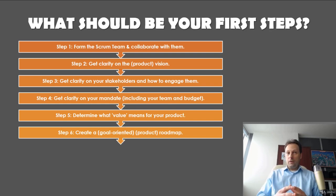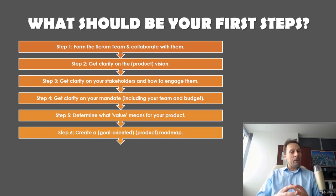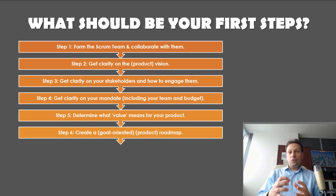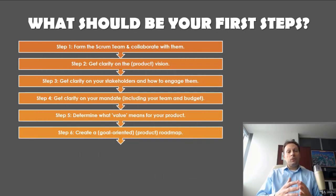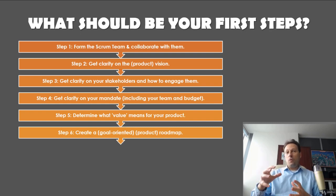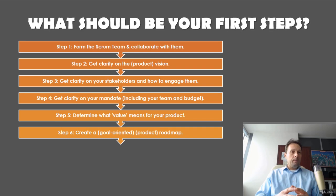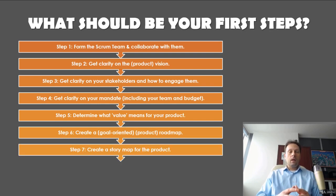Step six: create a goal-oriented product roadmap. Now that you've defined what value is for your product and how to measure it, translate this into a goal-oriented product roadmap. This type of roadmap is appreciated because it focuses on value and goals first, and features later. Many product owners fall into the trap of maximizing the team's output — but your goal should be to maximize the outcome. Start by defining a couple of goals for the shorter term and the longer term. This will make ordering and managing your product backlog much easier.